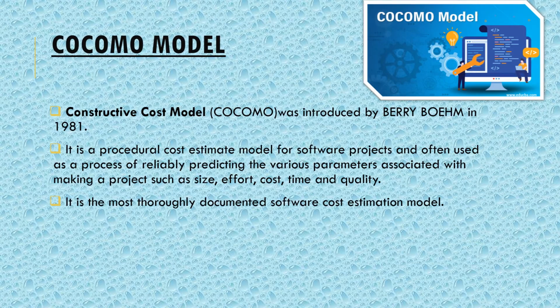Now the software project managers who take care of the entire development process use various techniques to estimate the cost of the project in the early stages of the software. They use techniques like expert judgment, algorithmic cost modeling, and also the COCOMO model. The COCOMO model is one of the most widely used software estimation models in the world. And COCOMO stands for constructive cost model.